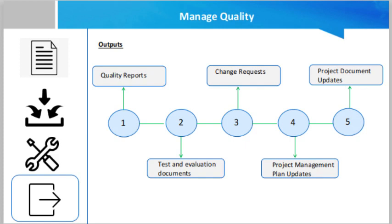Then test and evaluation documents, which are used in the next process of Control Quality. These include checklists to ensure all processes are done correctly, check sheets, requirement traceability, metrics, etc. Then change requests: as a result of this process, there may be recommendations for changes in the project management plan, project documents, and project management processes.